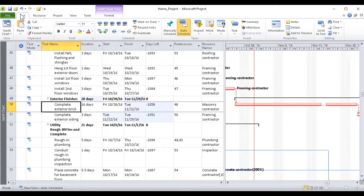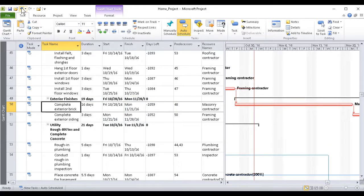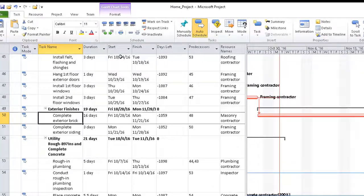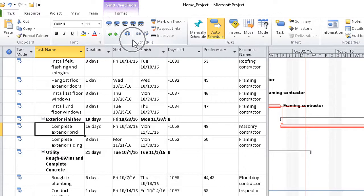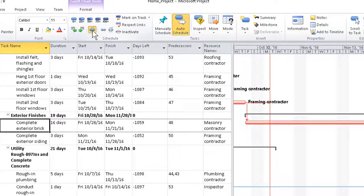If we need more — say, if a thunderstorm caused a two or three day power outage — we again go to the Task tab, Schedule group, and again click the button for the Split Task feature.